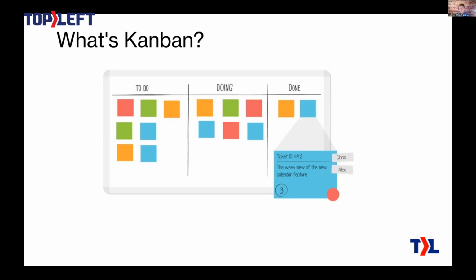And finally, Kanban emphasizes minimizing waste, and the primary way that you would think about that is by analyzing how we handle this work, whether it's our help desk work or our project workflows and whatnot. What are we doing to that as it starts out as new work, gets dispatched, engineers work on it, some of it ends up waiting for the customer again, and eventually it ends up being done? Thinking about how that happens in our team, are there any steps in there that are not necessary? By unnecessary, I mean mainly from your customer's perspective, because that's how you analyze waste: things that aren't adding value to what you're delivering to the customer.